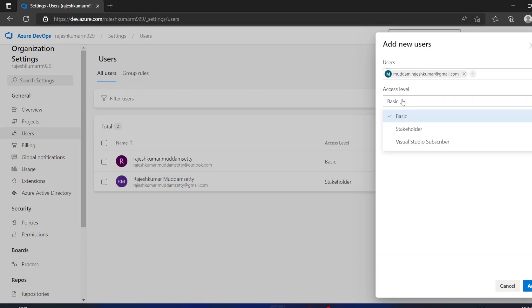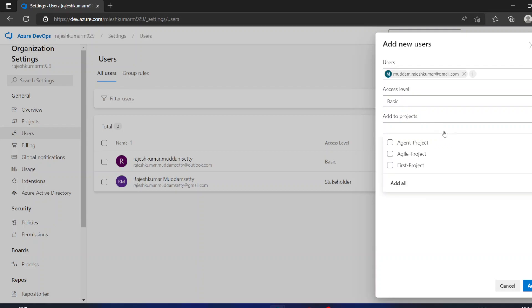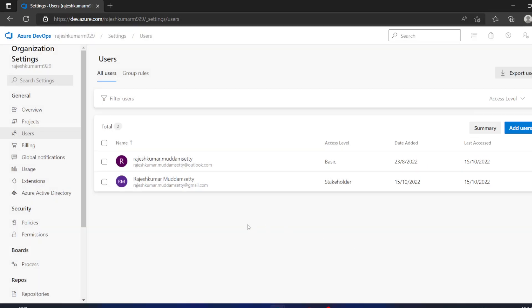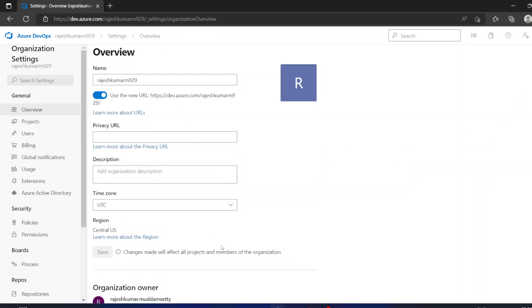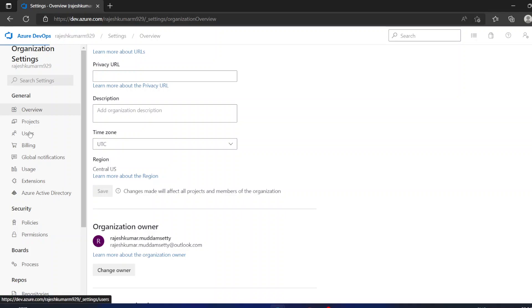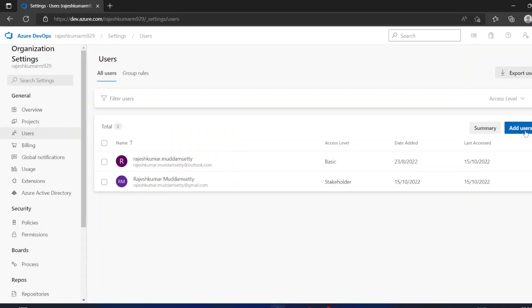When adding a user at the organization level, you can choose a permission level and select whichever projects you want to give access to — or add all projects at once. However, to add users at the organization level you need to be the organization owner. That is why I see the 'Add Users' button — I am the organization owner. If you are not the owner, you will not see this button.